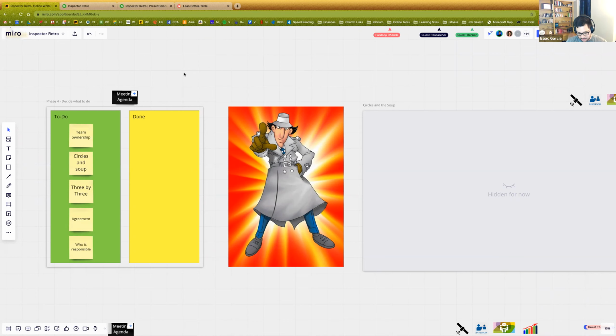And then I would probably spend 10 minutes on this next section, which is deciding what to do. So you've got your idea. We're going to run this experiment. Well, now the team needs to enable that. They need to breathe life into that. And so we're going to go through this. It's really helping you come out with, these are the action items that are going to enable the experiment that we decided would improve the conditions we talked about. And so then if you do all of that, that's 35, 40, 45 minutes. You could close and have a buffer of 10 minutes.